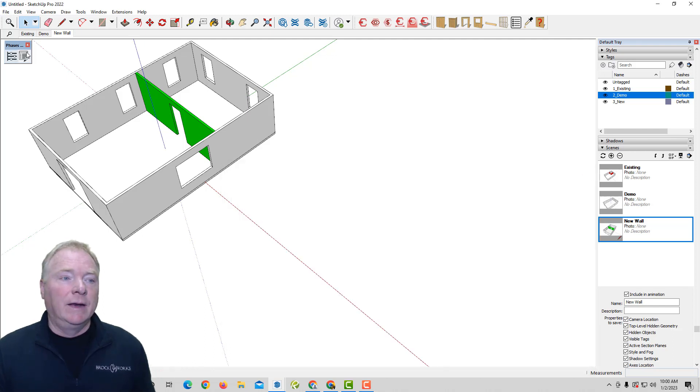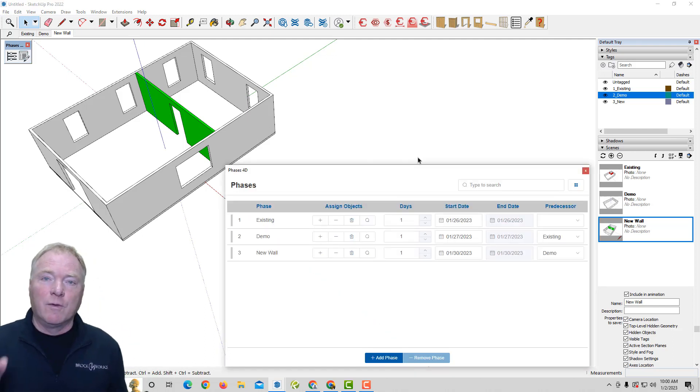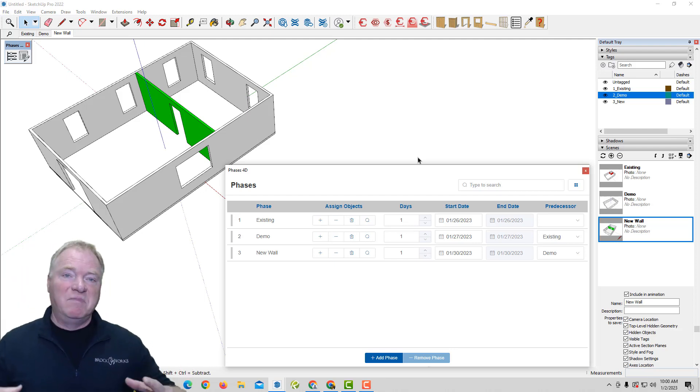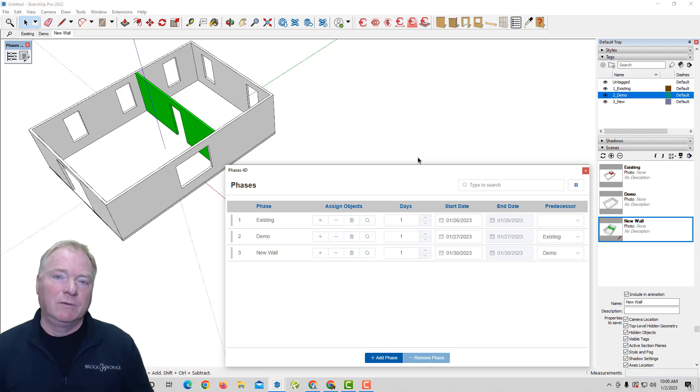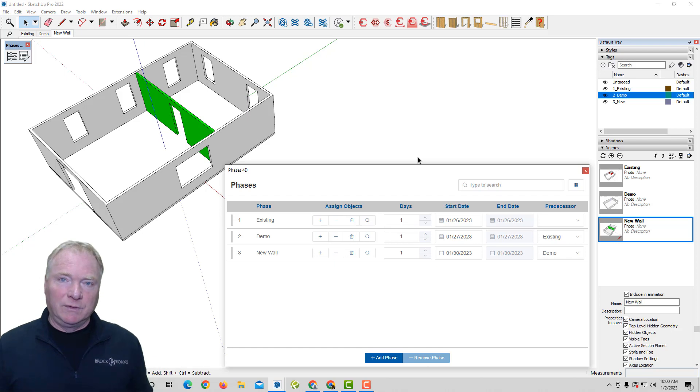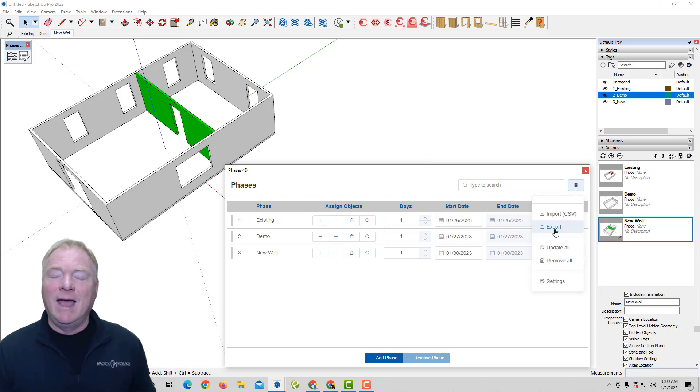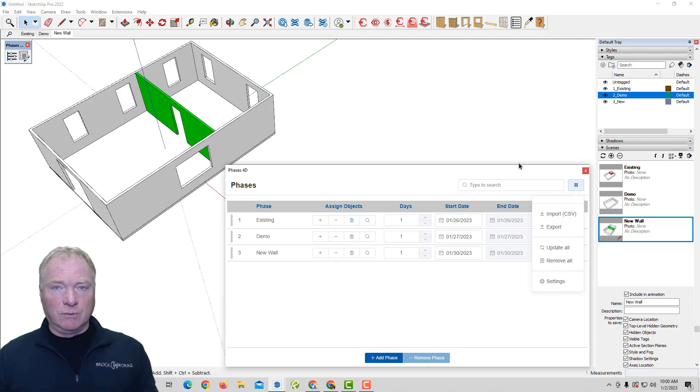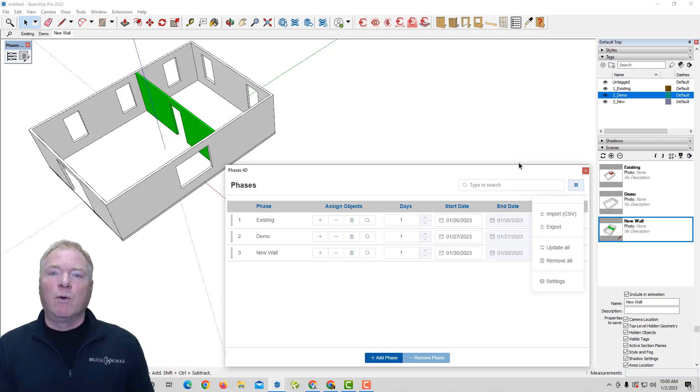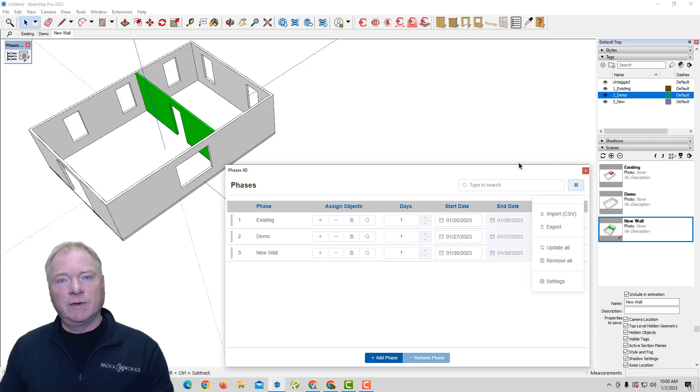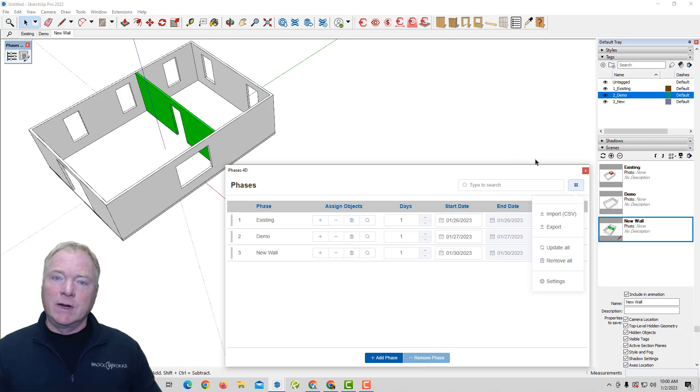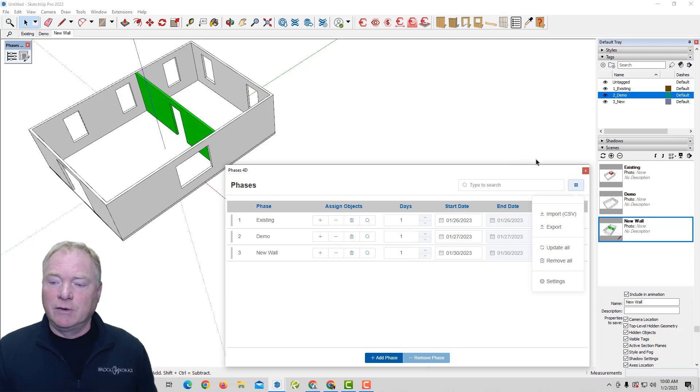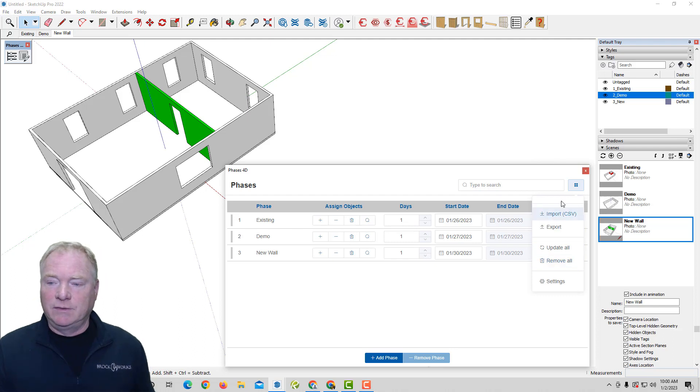And then another thing to consider is for me, I build houses and I have a template for my schedules. So once you've built a schedule that works for you, you can come over here into your settings and export that schedule or that phase, series of phases. And then later import them into a similar project. You're starting a new job. It's similar to this other one. You could bring in a template. So it's a big time saver. And then you would just adjust the dates from there, your start date. And you can update all your scenes. You can remove all your scenes. And that's the settings.